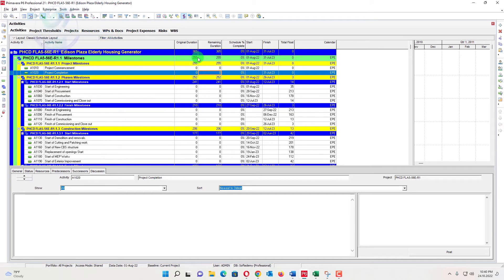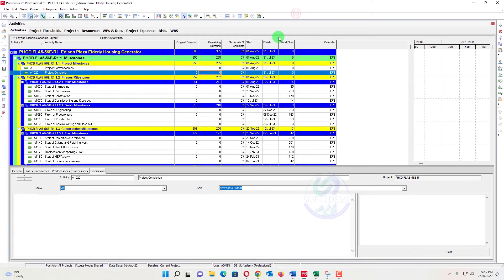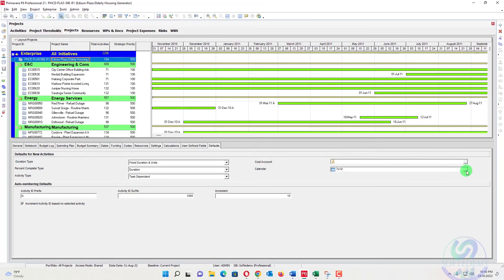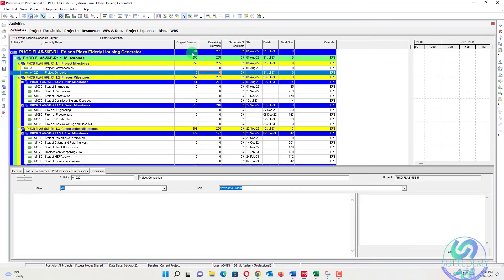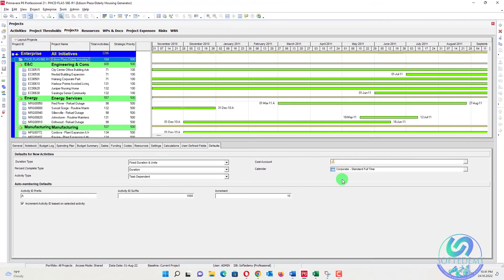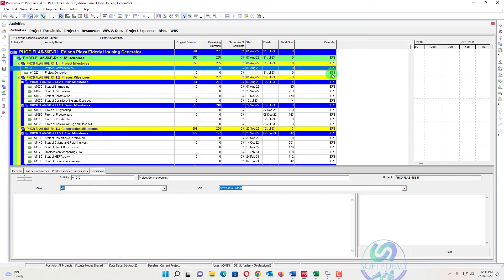At the WBS level, all durations are now shown according to seven-day work, which equals calendar days. If your client says the duration should match the contract — like 365 calendar days instead of 261 working days — this is the trick to use. If you want to revert to the previous view, just go back and assign the original calendar. Only the default calendar assigned at the project level will be shown at the WBS level; the calendar assigned to individual activities will not affect the WBS level display.